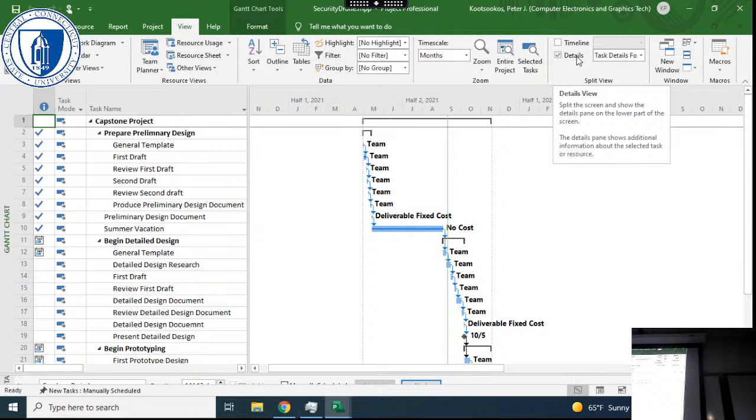So I made it a fixed cost item. The team I made have an hourly cost. And I made it up completely. I think the number I used for the team, which is going to sound remarkably cheap, was just $20 per hour. Now each of these items is done over one or several days.